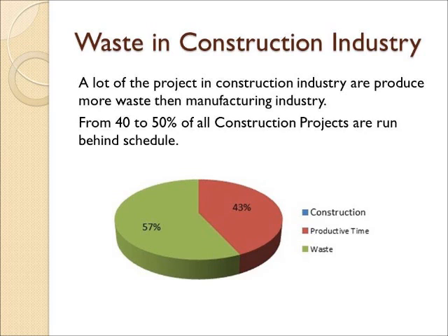Waste in the construction industry can be a big problem. A lot of projects in the construction industry produce more waste than the manufacturing industry. What this means is that the manufacturing industry is more effective than the construction industry. Doing research, I found that 40 to 50% of all construction projects run behind schedule. Also, on most construction sites, 10 to 20% of the purchased material is not used and ends up as waste.